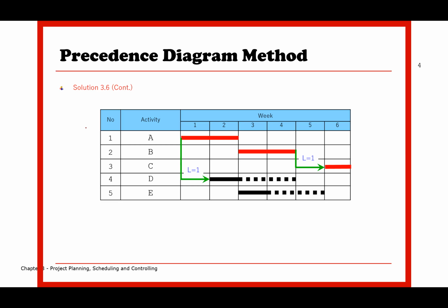Okay, you notice that when there is a total float, the dotted line indicates total float. You will want to use this total float later on, when we utilize resource requirements. Only then will you notice the importance of having float, because we want to drag the activity to a certain date. We do not want to do it as early as possible. We might want to use as late as possible, or even in between.